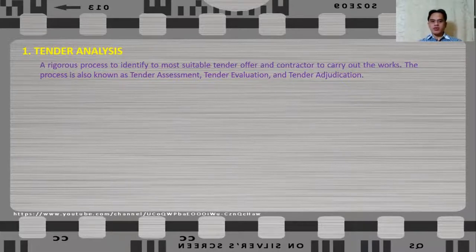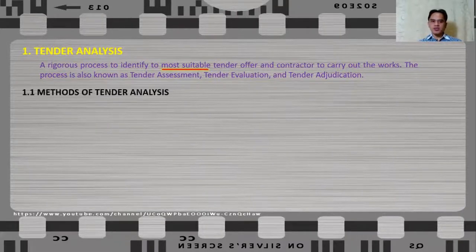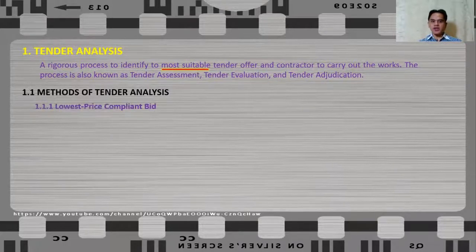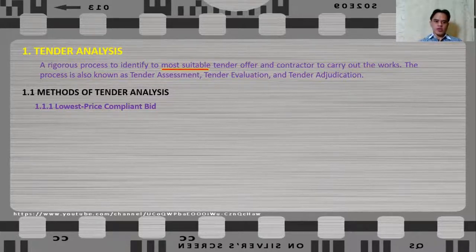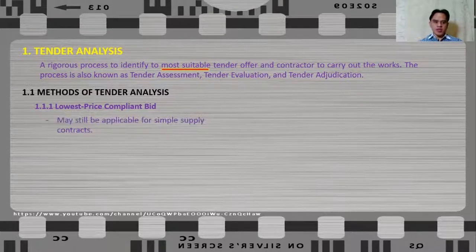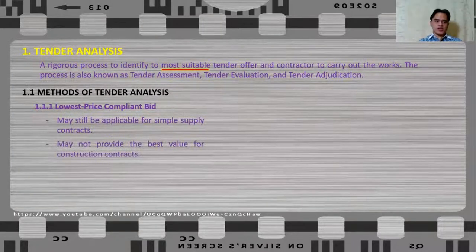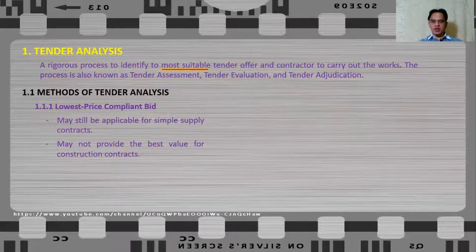In order to look for the most suitable tender offer, there are several methods of analysis that can be used. One of them is the lowest price compliant bid — basically this is just the lowest price that you receive, as long as the price complies with your requirement. This method may still be applicable for simple supply contracts.